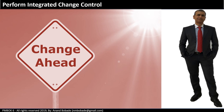Change ahead. Have you ever worked on a project where you absolutely delivered what was agreed in your first scope baseline? Mostly your answer will be no. Changes are raised as we learn more about our need of the product or service we are building. Change requests can be raised for defect repairs, corrective actions that realign project performance with the plan, preventive actions that ensure future performance aligns with the plan, or simply updates to your project management plan — especially if the original plan, schedule, cost, or approach itself was not right.